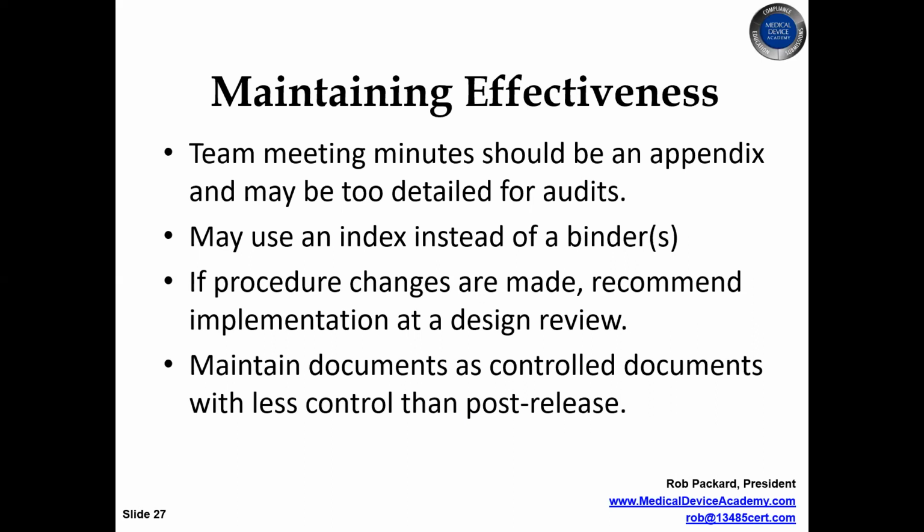What are you going to do with the open POs versus new POs? New POs, of course, will be the new approved specification, but open POs, like blanket orders, how will you phase that in? And you usually document that in the approval of the change. And you want to make sure that this is for streamlining the process. Try to make it as simple and streamlined as possible.